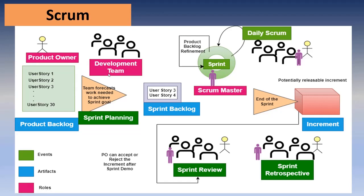In agile methodology we don't have different hierarchies inside the development team — no team lead, manager, or similar roles. Whoever contributes to a particular sprint as a developer or tester, the entire team is called the Development Team. No one is superior to another, which is why the development team is a self-organized team in agile. No one will assign tasks to you — among your team members you decide who works on which user story and which task, and you assign it to yourself.